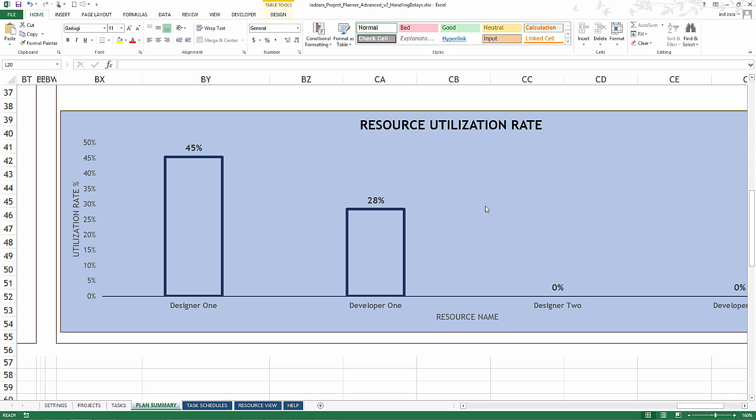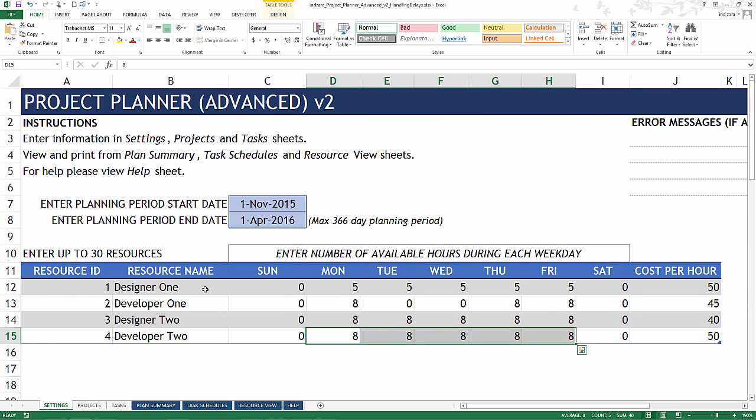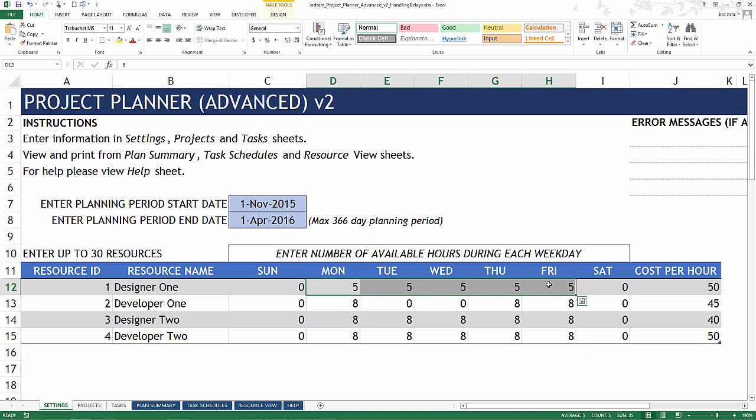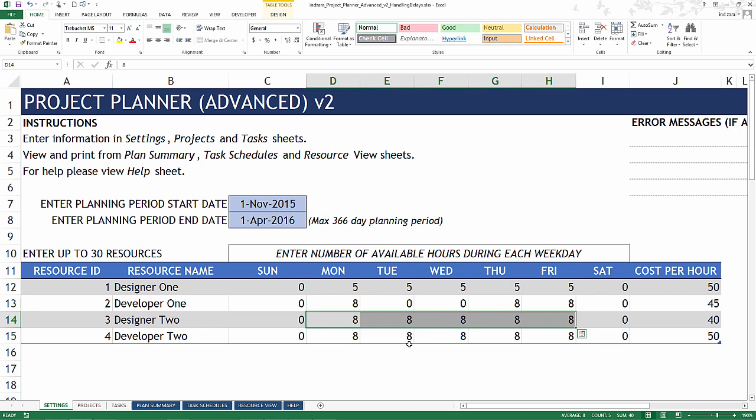Let's keep that in mind and I'm going to go back to the setting sheet. Designer 1 is assigned that task which is causing the delay and Designer 1 is only available 25 hours a week. But there is another designer. In the naming I'm implying that Designer 1 and Designer 2 can do the same task, they have same level of skill. Now Designer 2 is available 40 hours every week, so clearly if you assign that task to Designer 2 you have a better chance of that task being completed earlier.